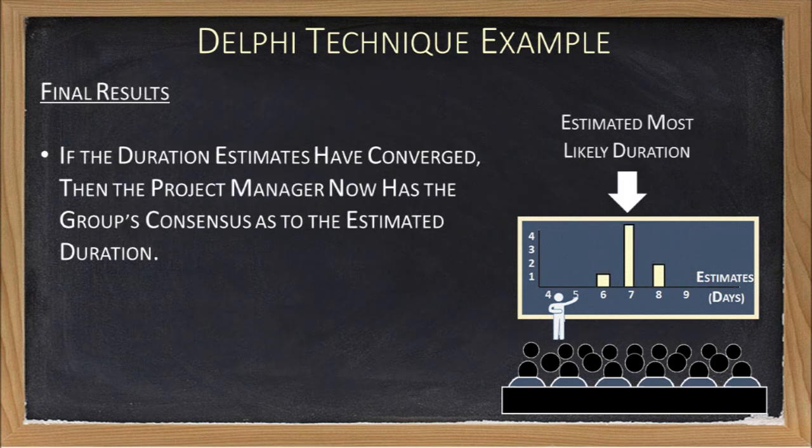The results of the group's third estimate should be showing that they are converging on an agreed-upon, most likely estimate. Keep in mind, it is normal within the estimating process to have variation, and this should be expected. But the results of the group examining, discussing, and analyzing the issue should be leading them to an estimated value that is reflective of the group's confidence.